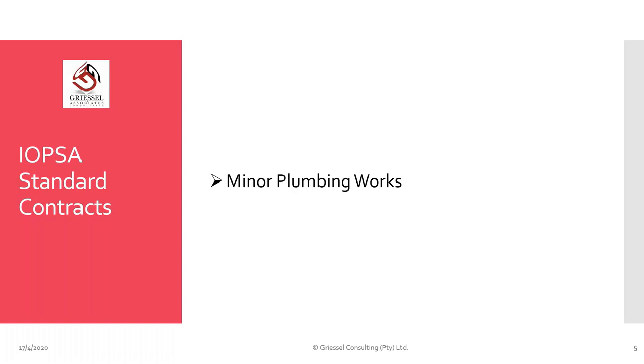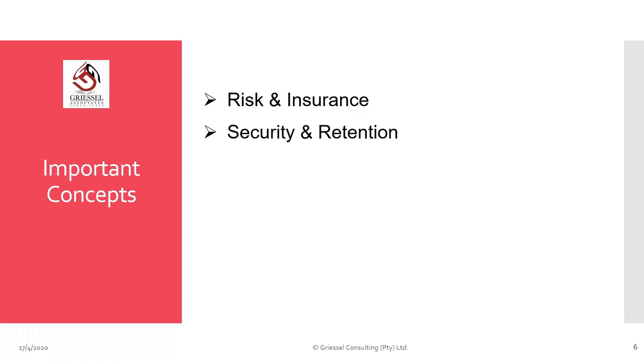The next aspect that I want to look at is insurance. The contractor has two basic insurance responsibilities. The first is, of course, to belong to and to pay over your workman's compensation so that your employees are covered by the COIDA Act. And then, of course, you have to have third-party insurance should anybody else be injured on site. And it will probably be included in your contractor's all risk.